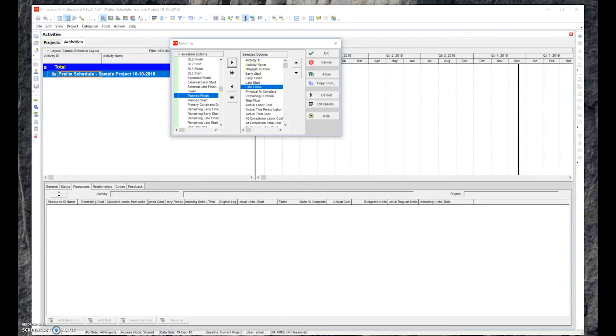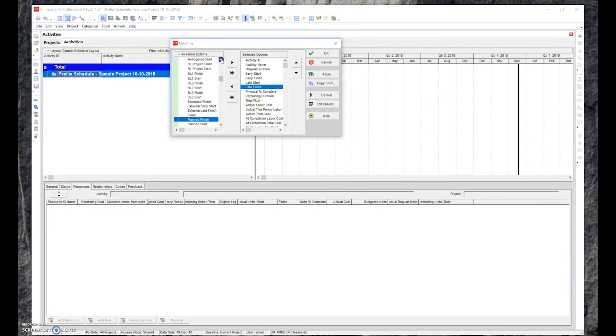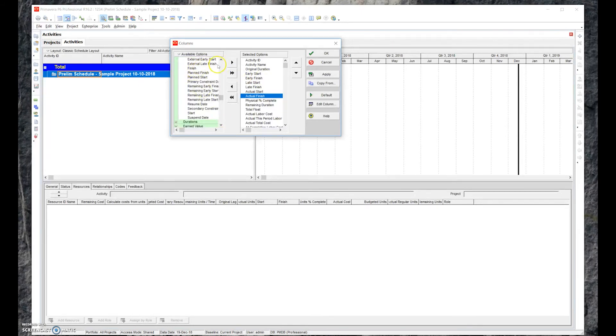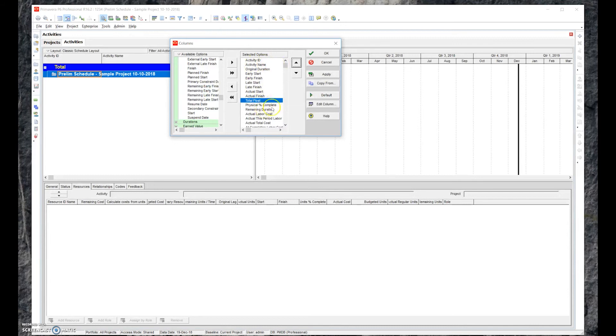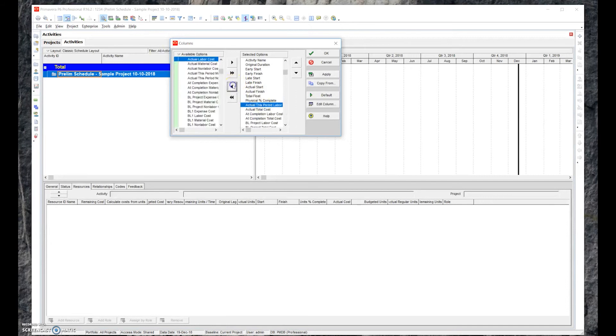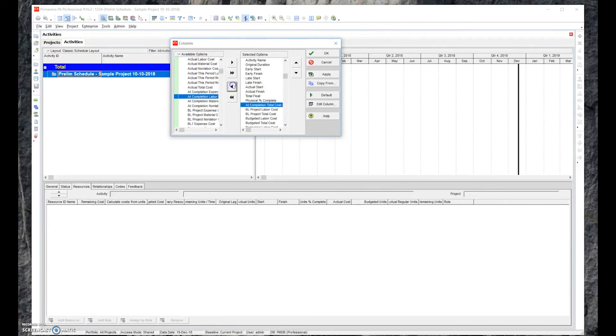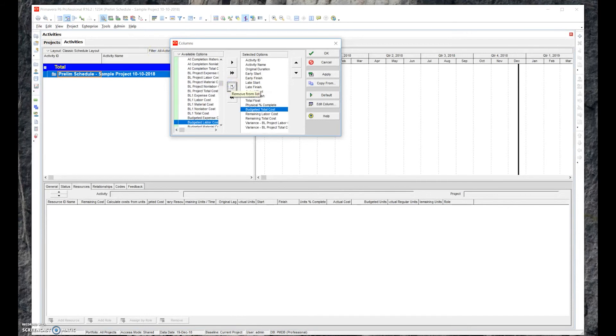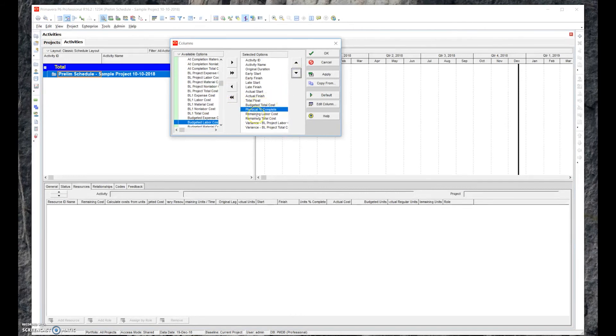The only other columns that we want to put in there are the actual start and the actual finish. If we go up here, we have the actual start and actual finish. So one of the last columns we want to do is we want to do the total float, which we have here. We also want to put budgeted total cost. We're going to go ahead and get rid of some of these items here, move them over. We got budgeted total cost. We want to have percent complete, the physical percent complete. Now there's duration percent complete, but we want the physical, the actual physical percent complete of the work on the job site.